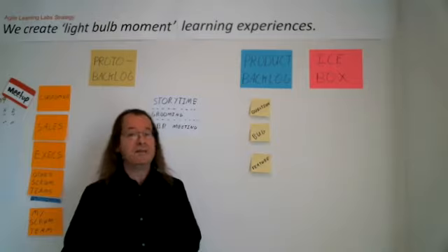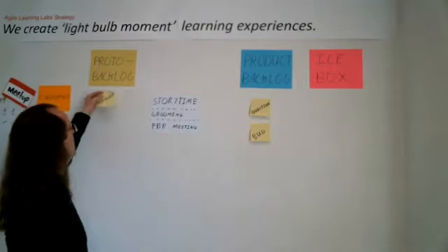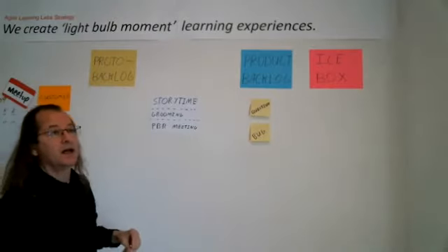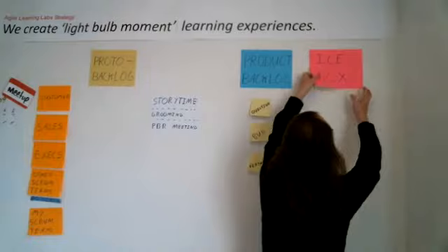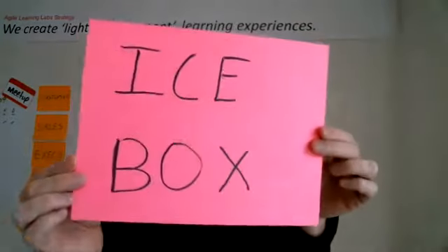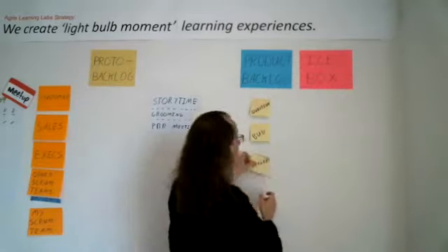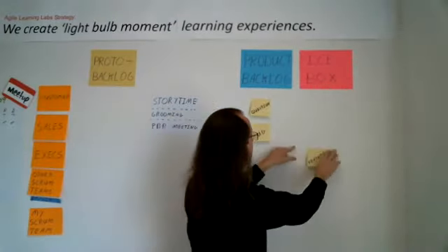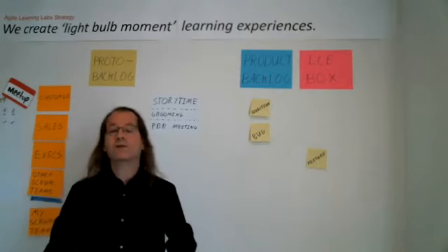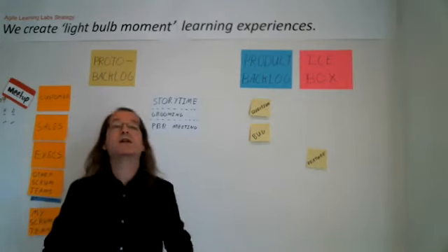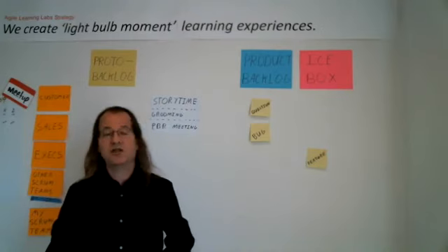Well, the exact same thing we do with things that didn't make it past story time or even the initial refinement in the ProtoBacklog. They go into this thing that I've always called the icebox. And the icebox is an unordered, unmanaged list of things that we don't expect we'll ever get to. And so we're not going to have it cluttering up the product backlog. We're not going to spend time actively managing or refining it.